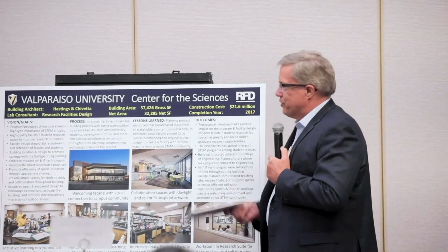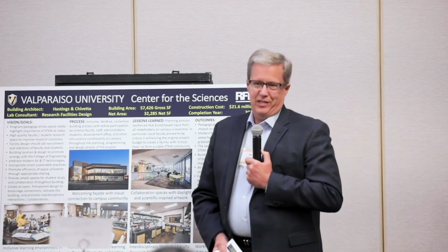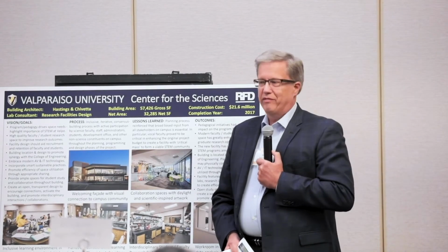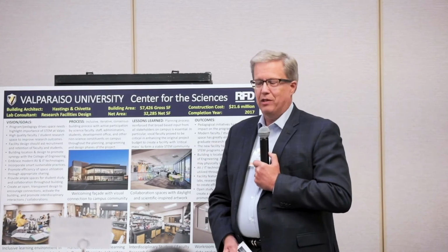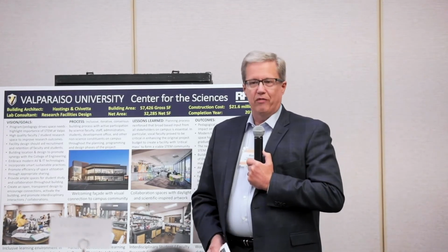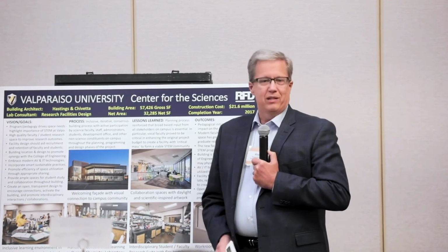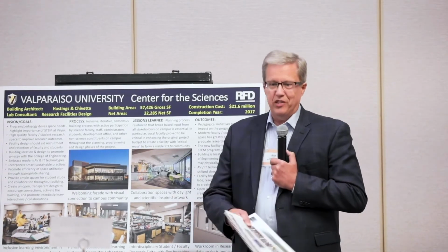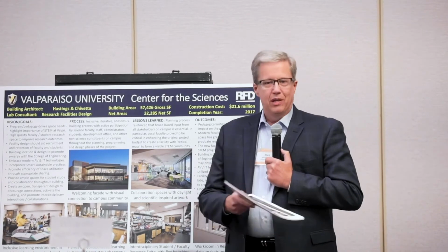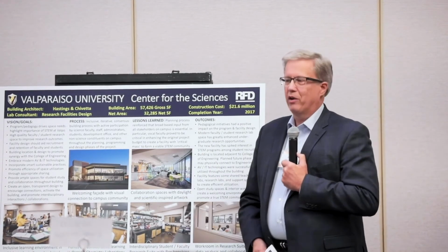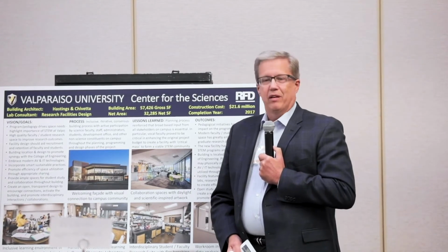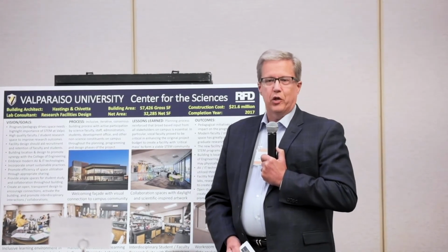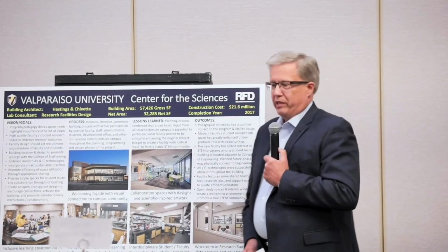One of the important lessons learned is the importance of user advocacy. Along the way, the faculty felt strongly that the project wasn't big enough to meet the critical mass. This building houses all of chemistry and molecular biology. And at one point, the project wasn't big enough to house the things necessary to create the critical mass between biology and chemistry and biochemistry. The faculty advocated, and the board ultimately approved a slightly larger project so they could really get what they needed.